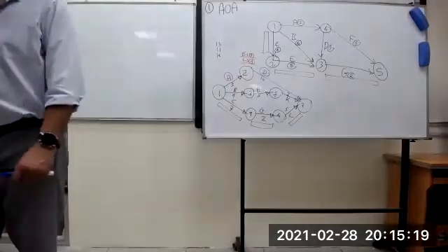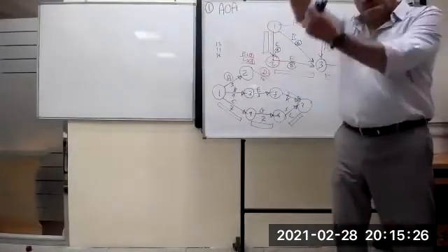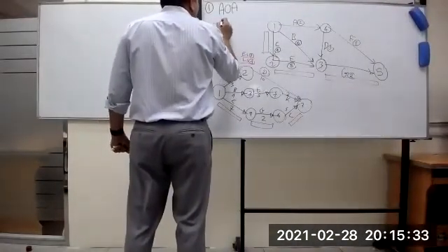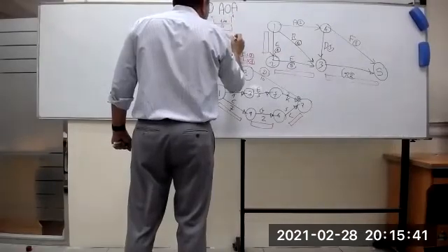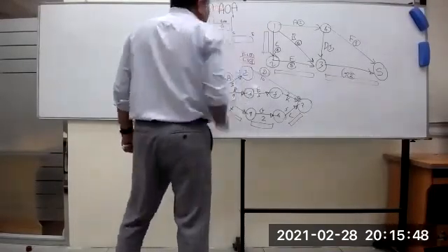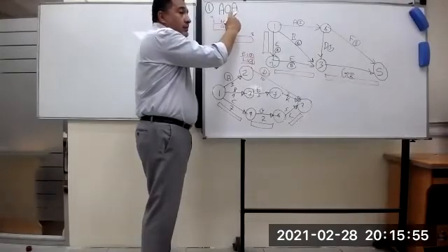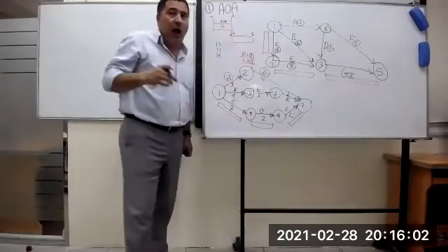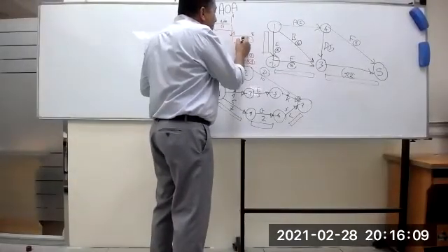We are adapting the by-the-end-of-the-day technique. What is the meaning of by the end of the day? The next activity starts at the end of the day. For example, if activity A equals 4 days, you start with 0 and finish at 4. In the other technique this activity should start on the second day, 5, and with 3 days, 5 plus 3 is 8. Do you understand what I mean, guys? But in our exam, by the end of the day technique, it's 4. And here, 3 more, you are at 7.